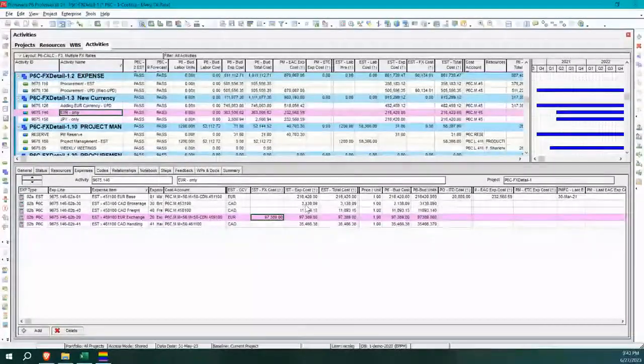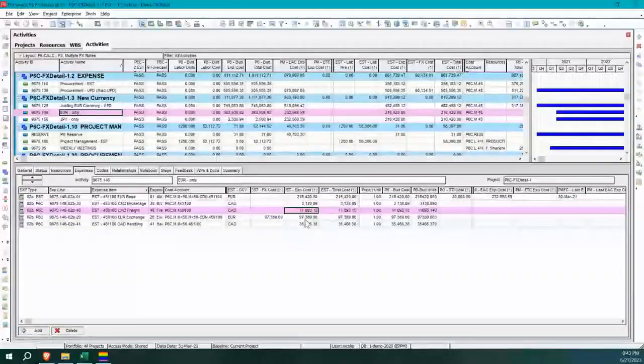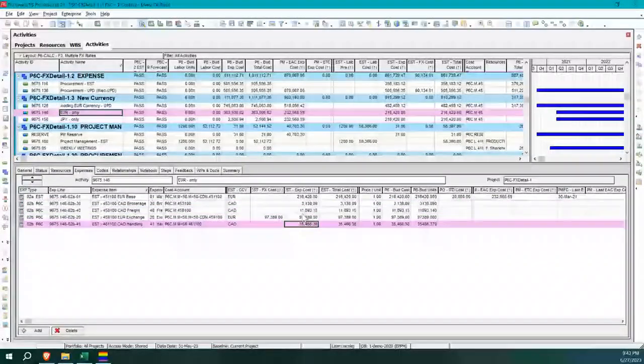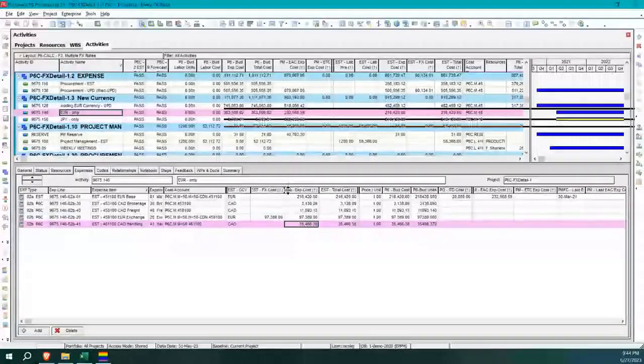And then we're also calculating the additional components that we're going to have to spend to get this equipment into Canada and get it to the project. So that's another huge piece. And this is all done automatically. Okay, so if we have to sit there calculating those different rates, the 11%, 3%, etc., it'd take a lot of time, even if you had it in Excel.